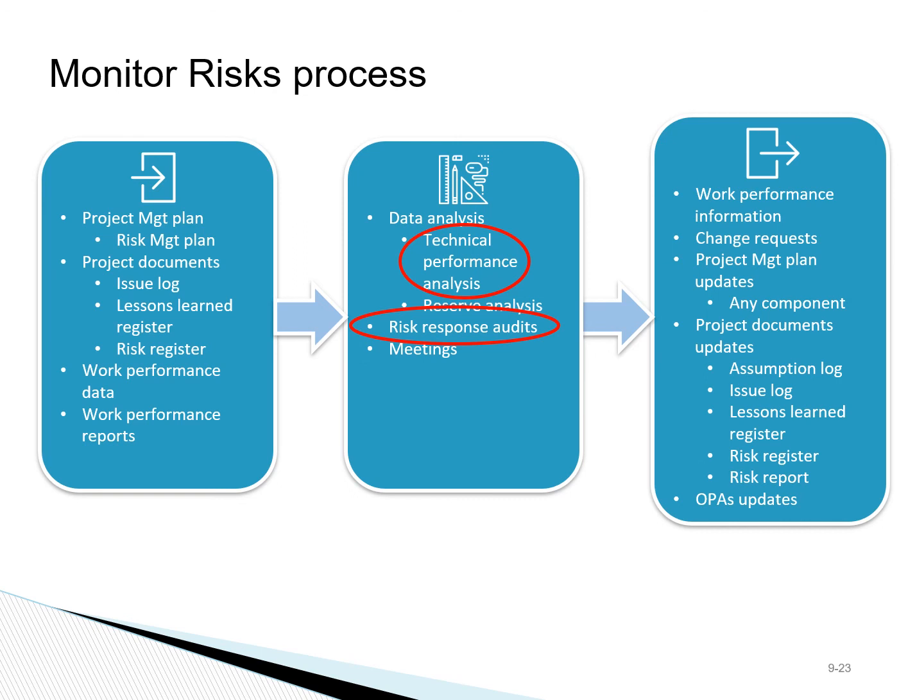So, like many other processes, we need to monitor risk throughout the project. Risk is something that the monitoring aspect of it is actually more important because risks do not stay the same throughout the project, so they actually need to be reviewed and updated throughout the project. While we are following our risk plan, we need to control the risk. For example, making sure through audits that all risk response measures are actually in place.